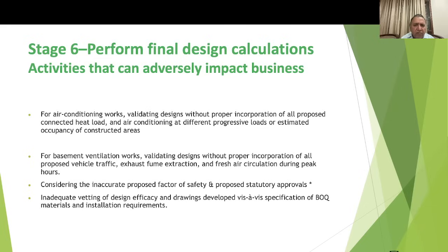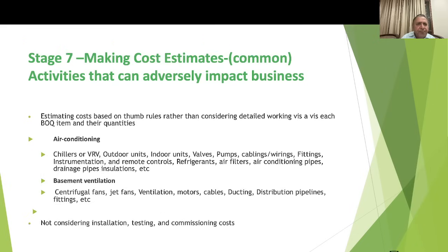Stage 7 is making cost estimates. Some designers go by thumb rule rather than detailed working. For air conditioning, designers need quick estimates for main BOQ items such as chillers, VRV outdoor and indoor units, wall pumps, cabling, wiring, fittings, instrumentation, remote controls, refrigerants, and air filters. For basement ventilation, cost estimates should cover centrifugal fans, jet fans, ventilation motors, cables, ducting, and distribution pipelines — based on required quantities. Not incorporating costs for installation, labor, testing, and commissioning is a key risk.